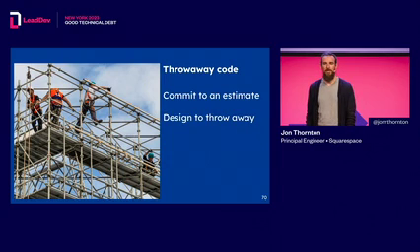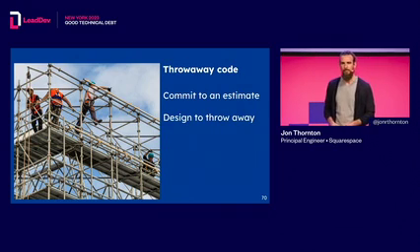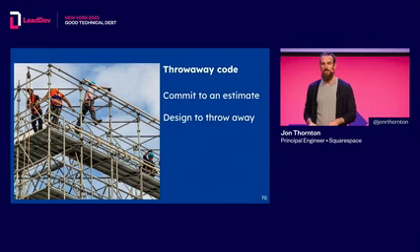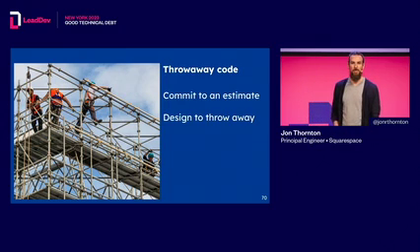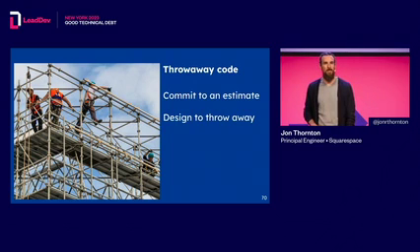Our email sender scaffolding was designed to be thrown away and communicated as such right from the planning stage. The code was well contained behind an abstraction, and we took care to limit which parts of the app integrated with that throwaway code. Now, designing your code to be thrown away is a good habit to get into regardless of whether you're planning to throw it away or not. It'll help us come up with better abstractions. In this case, because it was throwaway code, we didn't waste time nitpicking over small details in the code review, and this made the scaffolding even cheaper to build.